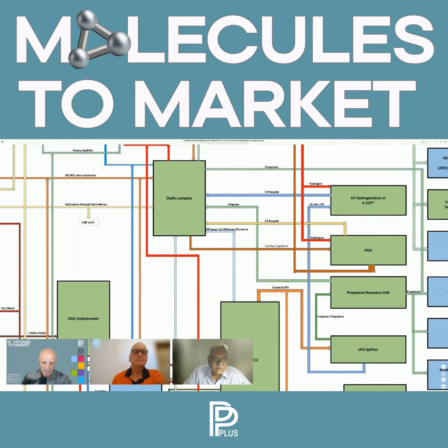So that document is not basic engineered, in the sense that it does not have many details which have to be worked out by the consultant or an engineering company, and the documentation or the process package has to be updated before I can take it forward for detailed engineering. This takes time. So what we have been trying to do in the recent cases is that there are 4 or 5 things which we insist should be performed by the licensors.